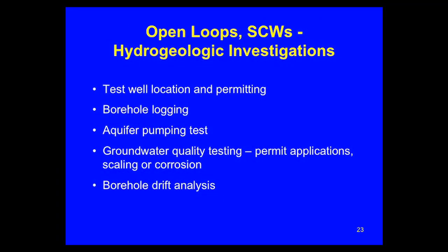So I spoke about the open loops. I personally, as a geologist, like to get more involved in the open loop systems. They're more challenging. They involve permitting. We're taking water out of the ground. There's usually a regulatory agency that wants to know, are you affecting other users of water? Are you affecting the environment when you take the water out of the ground?